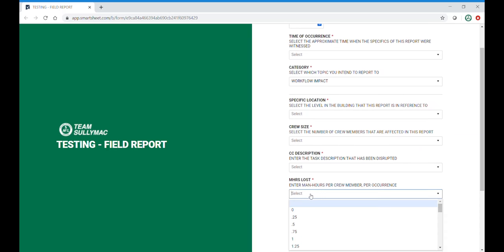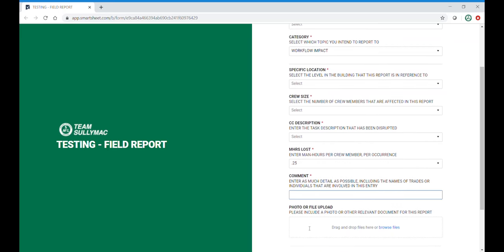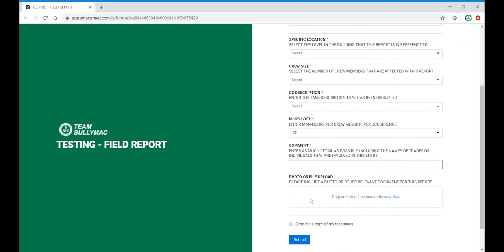Man hours lost per crew member. You can also click on the floor, comments, which you'd want to put as much detail as possible, and also a photo and or video. Click submit and it will go to the back end document.